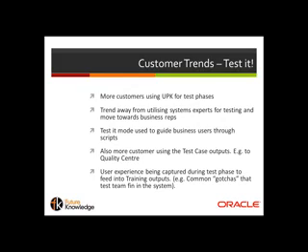So having business reps doing any of the unit testing or system integration testing or those phases is typically not done. So I think what this enables us to do is move towards using those sorts of resources in earlier phases of the testing phase of a project. And it's because you can guide the users more effectively using the tools in UPK.